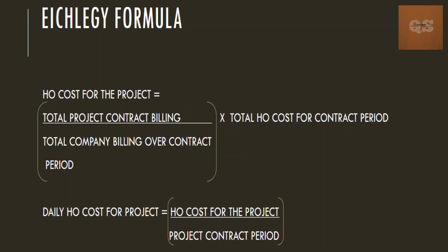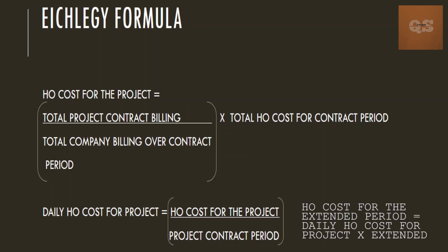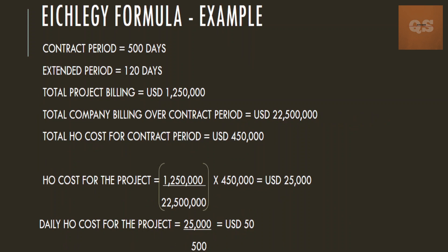Once you find out the head office cost for that particular project, you can find your daily head office cost by dividing that figure by the project contract period. Once you have the daily head office cost, multiplying it by the extended period gives you your head office cost for the extension period.